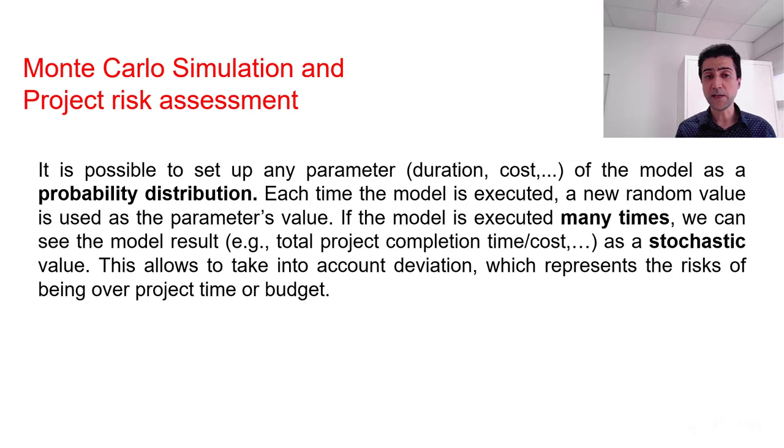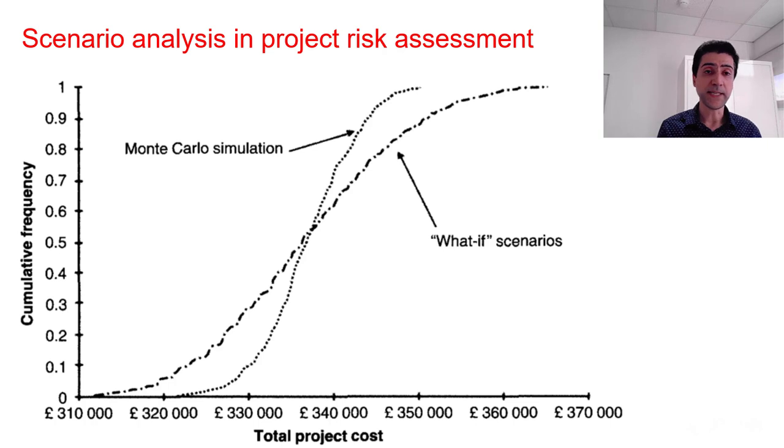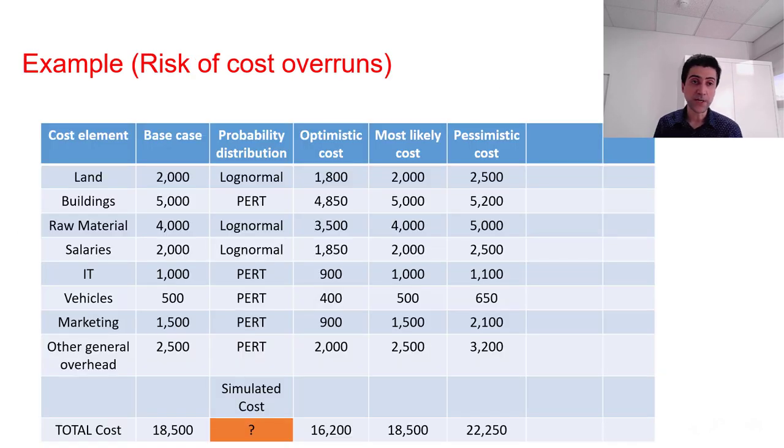As you can see, one example in here, which is focused on project costing, you can see that a base model using Monte Carlo simulation is developed. And then we can look into different scenarios, best case scenario, worst case scenario and compare those. We will have an example. This particular example is a mini project with different cost centers, including land and buildings and raw materials. As you can see, the base case is specified, but we want to be more flexible and using probability distributions for those cost centers. As an example for land, we are using a log normal distribution. Then the optimistic cost is 1800, pessimistic cost is 2500, and the most likely cost of 2000 is assigned.